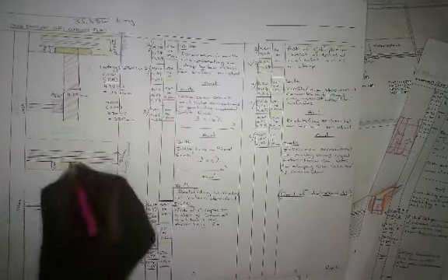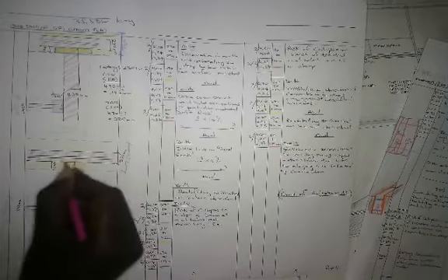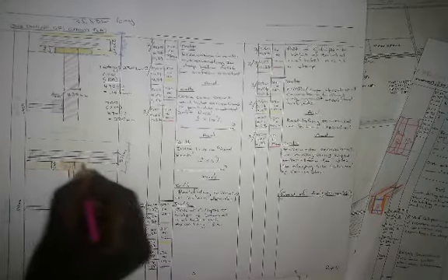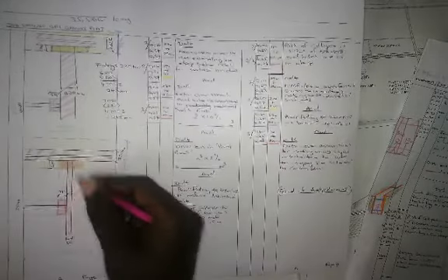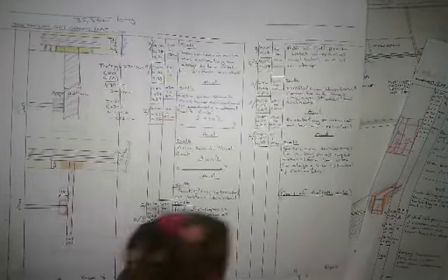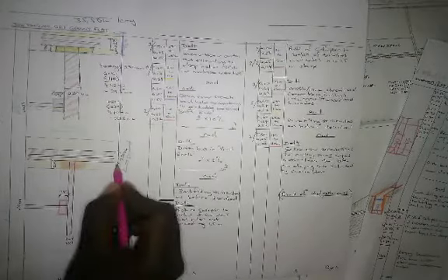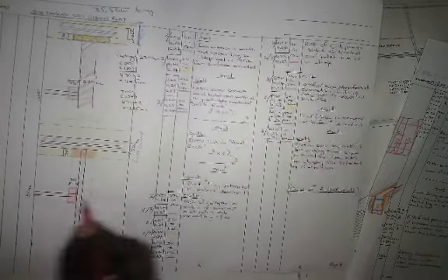Same situation that is happening between your 270 and 110 wall, okay. There was already an excavation here for your 270 wall. Now here comes your 110 wall butting against your 270. Now this part has already been excavated, guys.